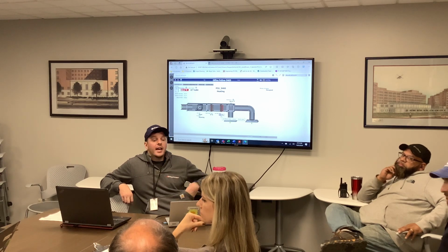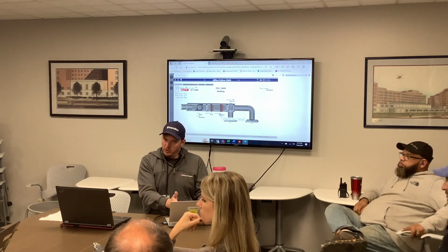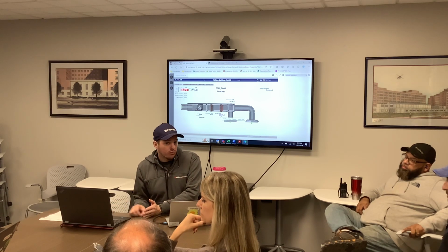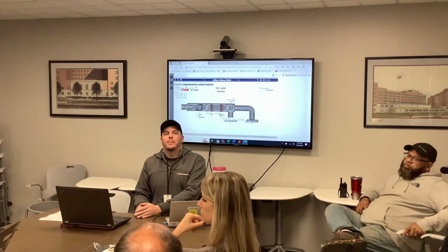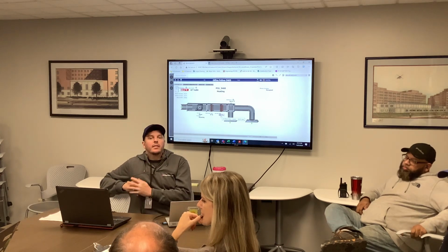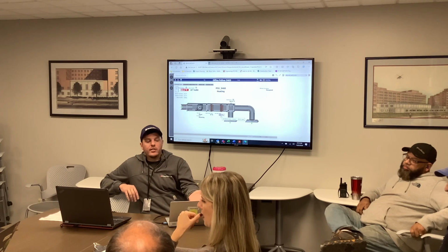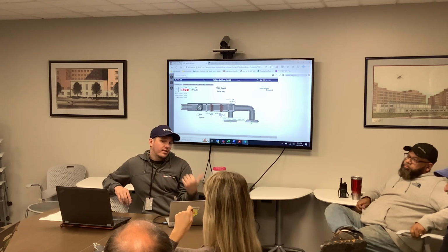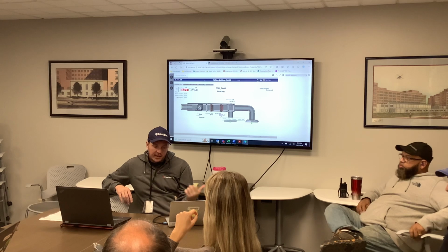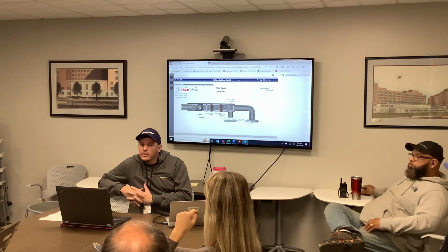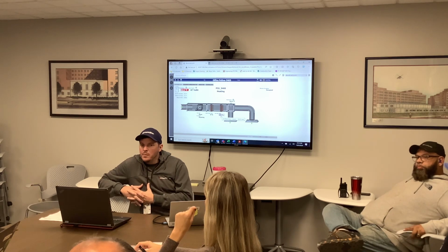Mhm. Yeah, and so that's how this needs to be reprogrammed, because when we got it, we thought there was gonna be hot water in that pipe all the time, that's how it was written. We thought it was gonna be tied into the heat exchangers in that mechanical space. That's exactly what we thought. Makes sense. So that's how we programmed it, so now I need to go back and say, I need to get a sensor on that dual temp pipe, and I need to disable it when I see chilled water, and vice versa. If that makes sense.